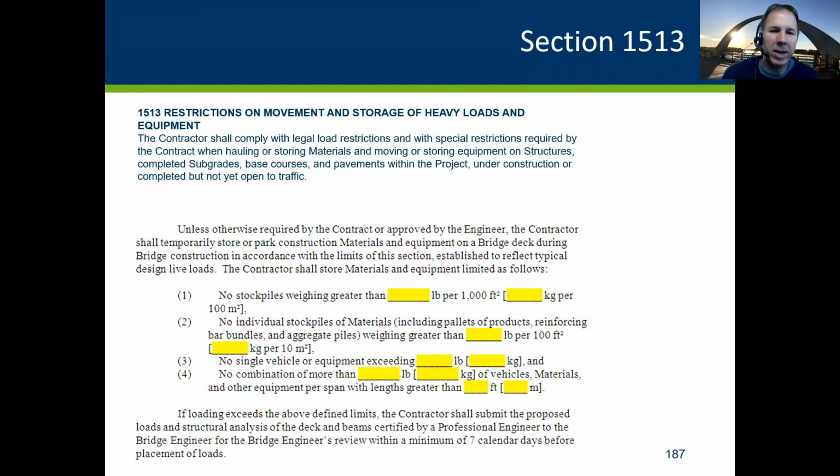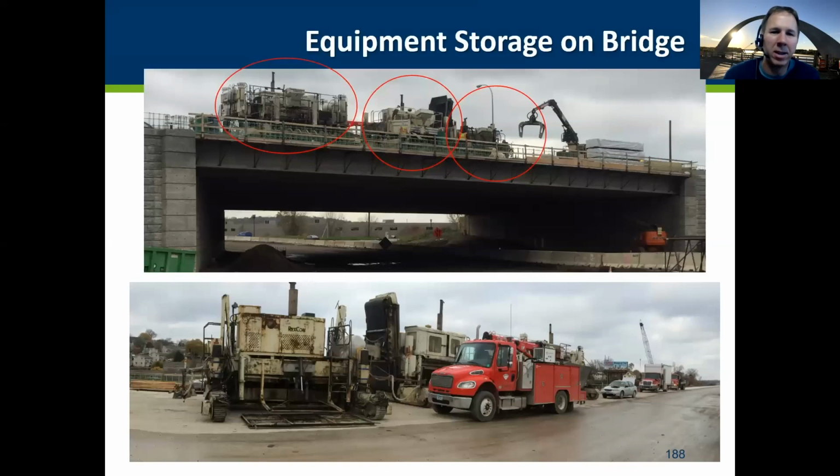So again, if you have interpretation questions like this one, it came in, this is a brand new bridge. You can still see the overhang brackets on here. And the inspector was very observant and said, that's a lot of equipment sitting on that bridge there. Those pavers aren't light. He had no idea how much these things weighed, but he saw the contractor using the new bridge as a parking lot for all their equipment. And it turns out that that load is probably the highest load that bridge will ever see.